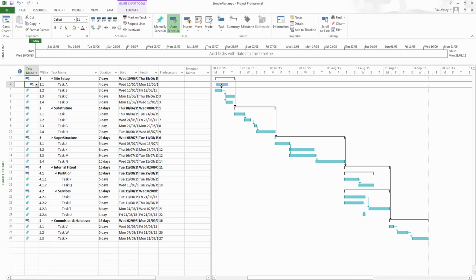And you'll also see on the Gantt chart itself that it has changed the coloring and how it displays these individual items. Again, when you're looking at Gantt charts, particularly the printouts, I suggest you familiarize yourself with this, because if you see a situation where it's using this kind of cyan color, then odds are the tasks have been manually scheduled and it could present problems in the project program itself. So let's just grab all of this and drag it down, changed all of those en masse, and there we are, we have our project schedule.